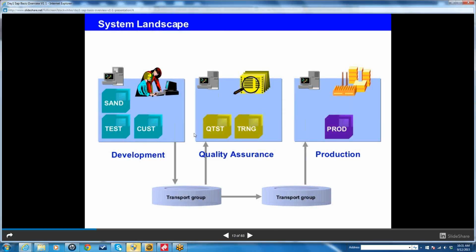In quality, the recommendation is actually two systems. One is integration testing; whatever you did in unit testing, that is by yourself. Integration means there will be end-to-end planning depending on how many modules you are implementing. If you are responsible for HR, somebody is responsible for benefits, somebody for time, somebody for payroll. You are doing end-to-end testing here. HR people will enroll employees in the different companies, different types of employees like staff, exempt, non-exempt, or union employees.